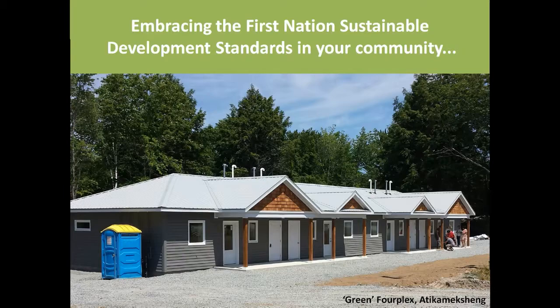I should point out I wasn't the architect of this particular design. We had designed a 2-story fourplex in a really complicated site. When we started with the community, they said to us, of the 23 lots they had, pick the worst lots and let's do our rental housing there so that we have the best lots left over for market housing, essentially, for the rest of the residents. So in other words, their budget was going to absorb the complexity of the more complicated lots.